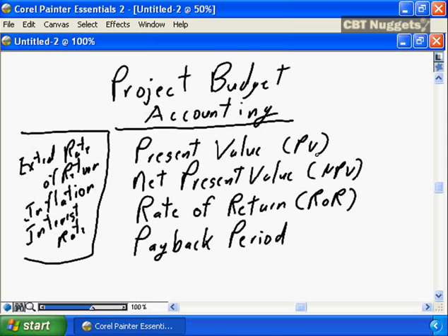So if your project is going to have a benefit statement of $15,000 in 3 years' time when it is implemented, what is that $15,000 worth in today's money, i.e. the present value, and that applies an expectation of what the interest could be earned, etc. The opposite to present value is future value, and that would often be taken into account in project calculations as well, where future value is just the opposite.